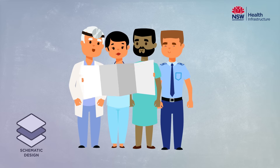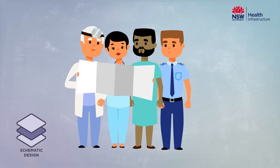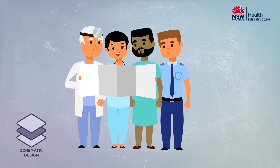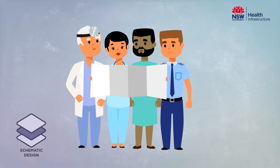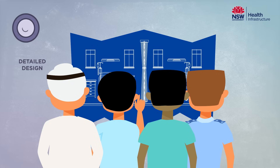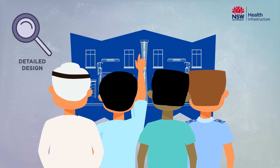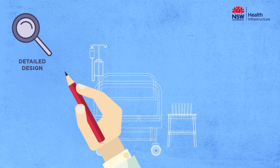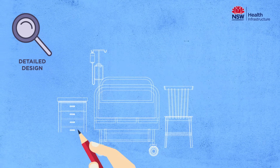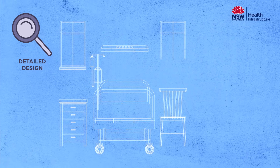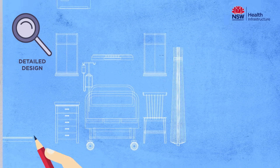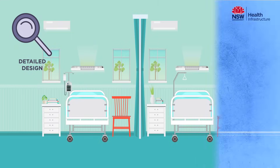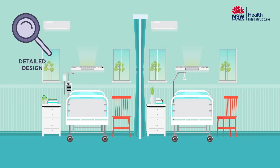Once schematic design is complete and reviewed by the project user groups, the redevelopment moves into the detailed design phase. During detailed design, the user groups look at the layout of every room and hospital space, such as the location of furniture, fittings and room colours, as well as the external façade and outside spaces.